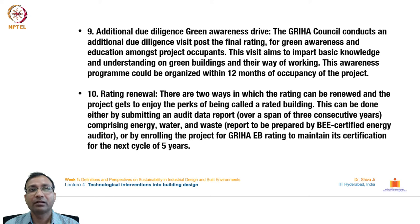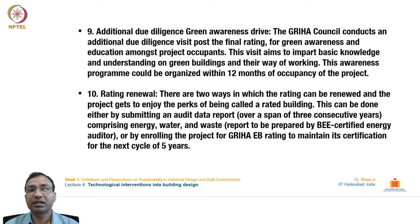Rating renewal can be done in two ways. Either by submitting an audit data report over three consecutive years comprising energy, water, and waste reports prepared by a BEE-certified energy auditor, or by enrolling the project for GRIHA EB rating to maintain certification for the next five-year cycle.